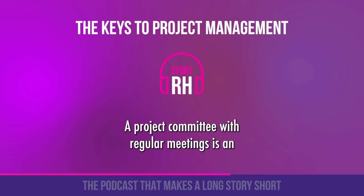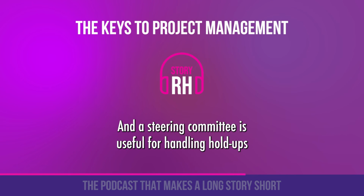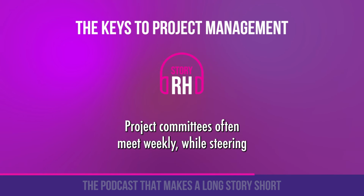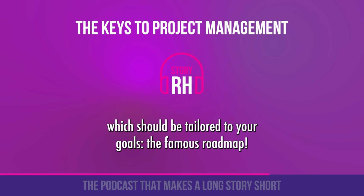That's the fourth key. A project committee with regular meetings is an opportunity to bring together all contributors to discuss their progress, examine any holdups, and explain works in progress. And a steering committee is useful for handling holdups and making decisions that guide contributors' efforts. Project committees often meet weekly, while steering committees generally meet monthly. But there are no hard rules. The frequency of meetings imposes a cadence, which should be tailored to your goals.